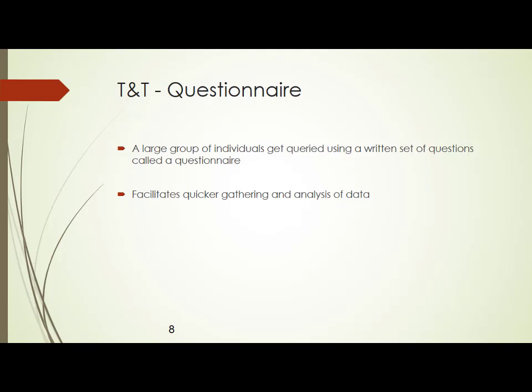Instead, I can create one questionnaire with some 10-15 questions, give them multiple choice options, and ask those operators to fill up the answers and give it back to me. So this is also one idea of getting the requirement from the stakeholder.